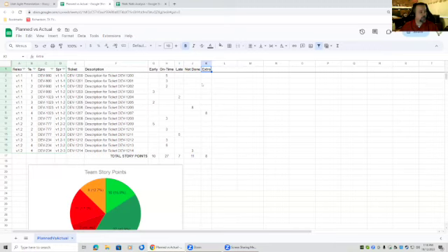Extra means unplanned. This was work that the team got tasked with after the wall walk was over and they're sprinting merrily along. There are multiple sprints to achieve the goal. This is your extra work that maybe is causing your team to deviate from the plan. One of the nice things you can do is you can add filters to this. So I've got a column for a release, could be a feature. I've got a filter for my teams. So if you've got multiple teams on here, you can filter to one or more team.